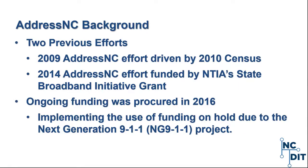Following the 2014 effort, CGIA developed a proposal defining what was needed to provide regular updates to AddressNC. In 2016, the legislature saw the value in sustaining AddressNC and appropriated funds to do so. CGIA held off on implementing these funds due to the Next Generation 9-1-1 project, wanting to reduce duplication of effort between the two projects. We didn't want to ask local governments for the same data at the same time by similar but different means, so we decided to delay AddressNC.